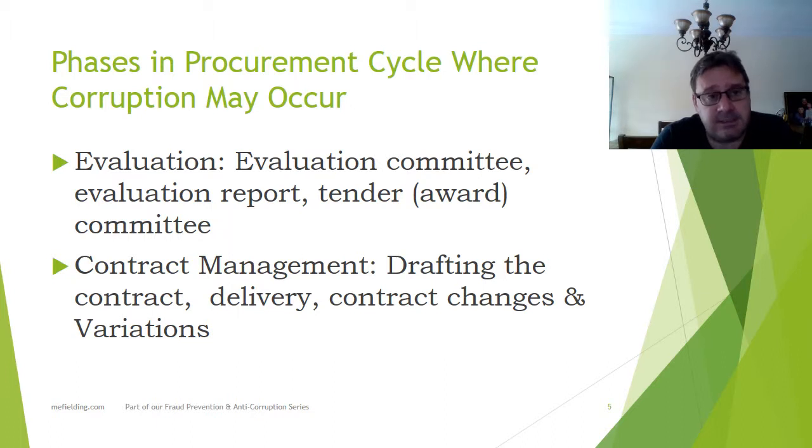This will be another process that you need to look at very, very carefully, because the question is, do you just do this to the best company, or do you do it to all of the companies? And I've certainly seen cases in the past where a company has been very good. They've won a tender, but they can only do 5 of the 6 requirements. And then as a committee you go to them and say, well, look, you don't have a specialist in how inheritance tax affects women's rights, for example, women's right to inherit. And the company goes, oh, we can't do that. So at that point, they've kind of lost it. You go, but it was in the bid, and this other guy goes, I can do that. So do you split the contract, or do you go back to another supplier? And this is all stuff that should be written down in the rules before you start.